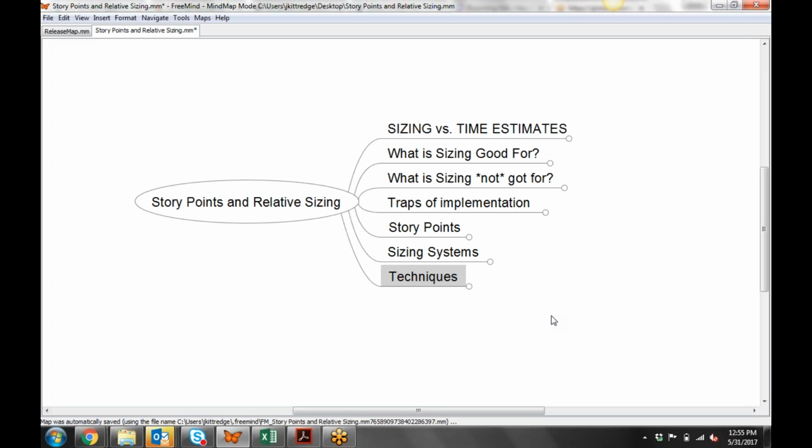What that means is that a customer or anyone else has the ability to predict when they're going to get something. What they lose is the ability of knowing exactly what it is. They get some sense of it: this is what our prioritization is, we think this is going to go in, but we're not promising it. On the other hand, you have feature box, which says this deliverable has to have A, B, and C in it. I can't accept it if it doesn't have all three of those things. There's no point in giving it to me unless those three things are in. So in that case, you can say, we promise we're going to deliver A, B, and C, but I can't tell you when you're going to get it.